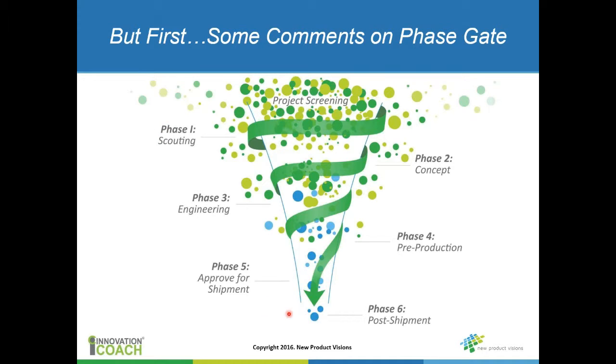So it's a very common tool, but there's a key distinction between this tool, PhaseGate, and what we're really going to talk about, and that is that PhaseGate is really an overall governance tool for managing a portfolio of projects. It's not a project management tool, and I think in my experience a lot of organizations mix that up. So it's a very powerful tool for managing the high-level deliverables of the project and institutionalizing a management overview of the project, but it doesn't really tell the project manager how to run the project. That's really based on the risk and is very context specific.